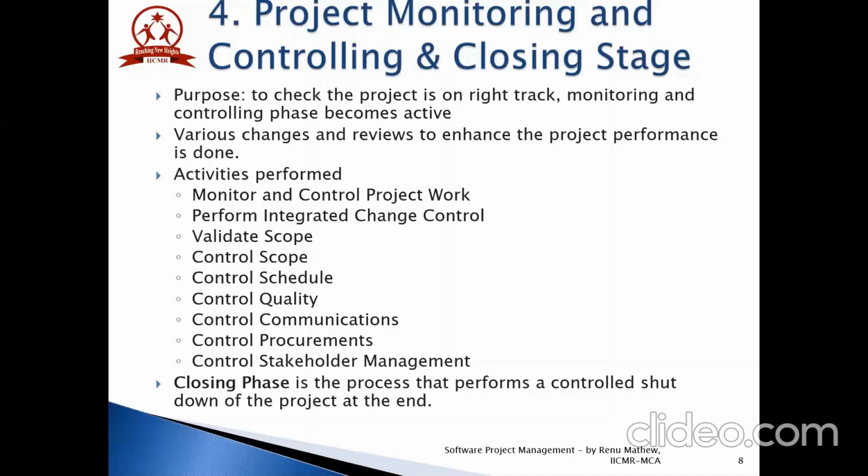Closure of the product is the activity of getting the customer to accept the final deliverables if the project is external. Closure of the project activity includes formally closing administrative procedures, updating project documents, and archiving those databases and documents. Closure of the resource behind the project activity is the financial closure of the project, and the resources assigned to the project should be returned.